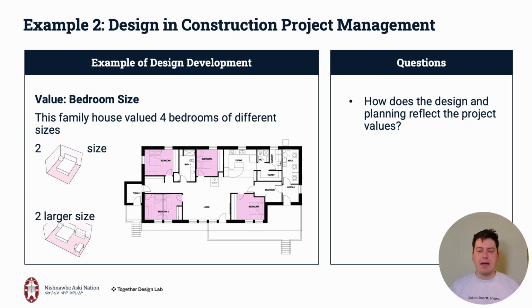But in this example, what was explained is that the way that large families often live in large homes like this can be intergenerational or multifamily, and that actually the arrangement that is preferred is to have a kind of 2 and 2. And so we move away from this 1 and 3 configuration, 1 primary, 3 smaller, towards 2 larger and 2 smaller.